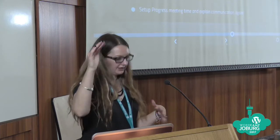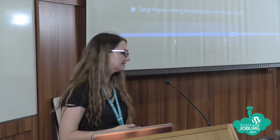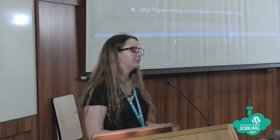Okay, so checklists and questionnaires. That's just the first step, sending them all what you need, all the requirements. So just deciding on what that is for your specific project. Then, depending on the project management software you use, you can copy a template of your project. If you've got the step-by-step of the delivering bit of your project, you just copy that for each client, and then send them a project management video. That is if you want them to be part of the project management. Sometimes you don't have to. I don't do it for all clients, just maybe a really big project, where you explain to them the specific software, if it's Asana or Teamwork.